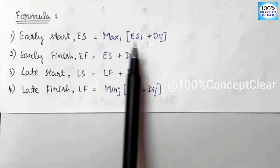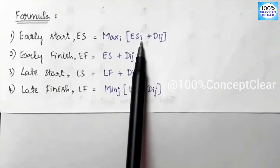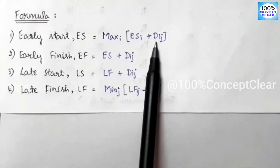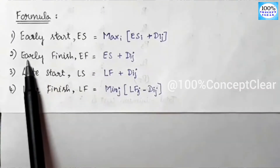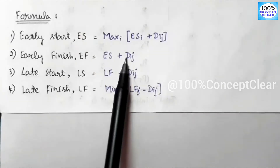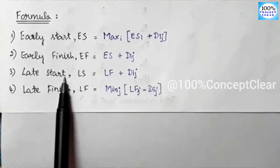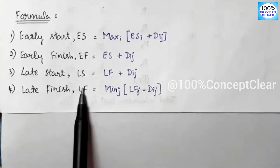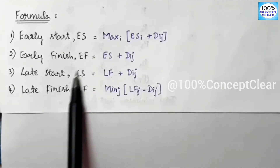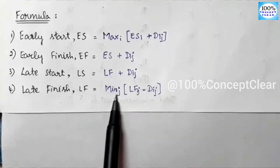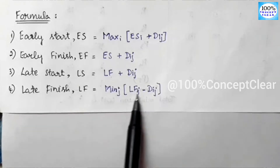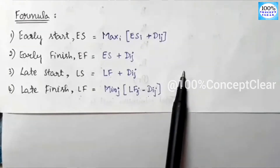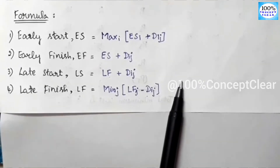The Early Start formula is: ES = maximum of (ES_i + D_ij). The Early Finish is obtained by adding duration to Early Start. Late Start is: LS = LF - D_ij. Late Finish is calculated as the minimum of (LF_j - D_ij). These formulas will be used to solve examples, with detailed solutions linked in the description.